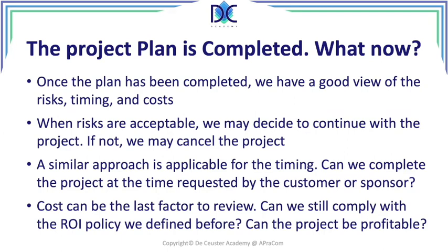What is the cost of the project? We can have a look at the return on investment policy, and we have to identify if the project still can be profitable. If it's not profitable, it may be better that we are in fact cancelling the project. In case we cancel, we've said it before, we go straight to the closing step of the project management process, and we put all the valuable elements there that can be used for later projects.